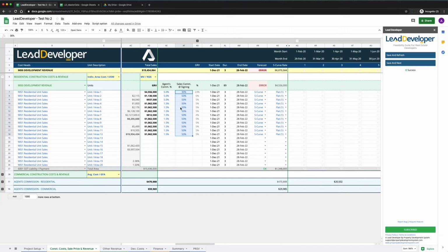So we are doing that to be able to figure out our outgoings, because this sale might happen even before you start construction. So unless you know that this is the money that you will need to pay up front, how will you know what your monthly cash flow is going to be for that period? So what are your outgoings going to be for that time? And we've got our dates, and we've got our S-curve distribution based on the steepness of the curve.